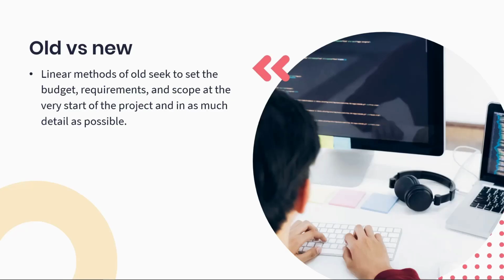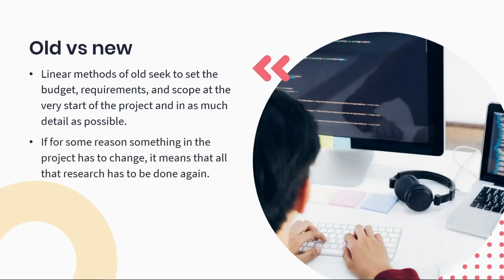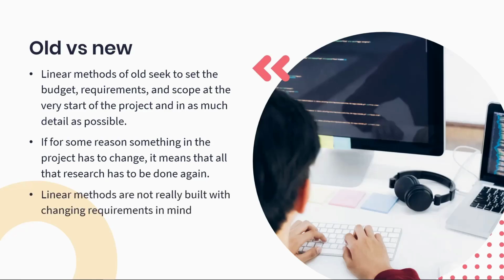In fact, towards the end. If for some reason something in the project has to change, it means that all that research has to be done again. It will have to be seen how that little change will affect the project as a whole. This leads to further delays, which is why we say linear methods are not really built with changing requirements in mind.